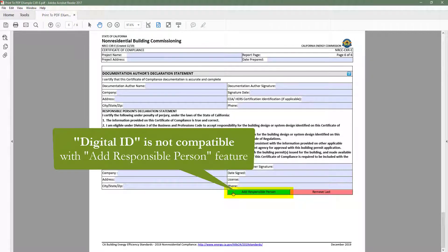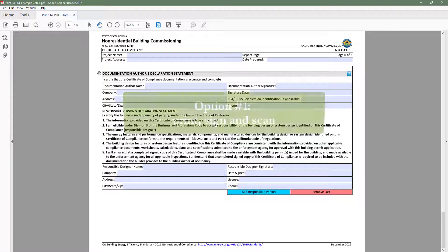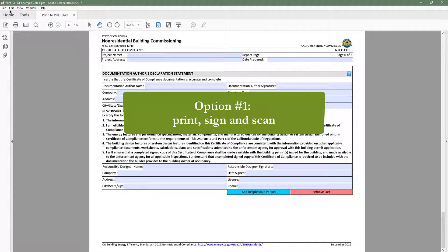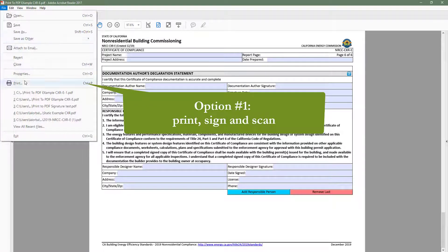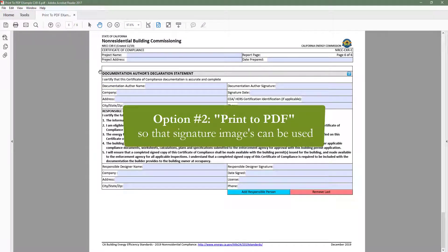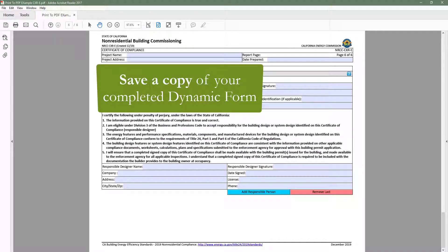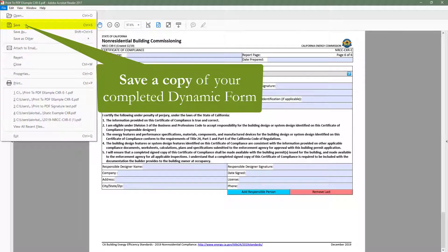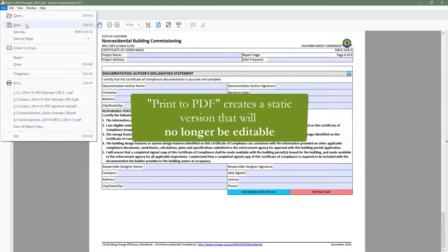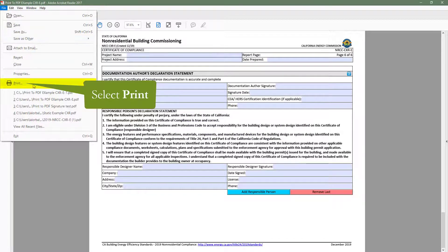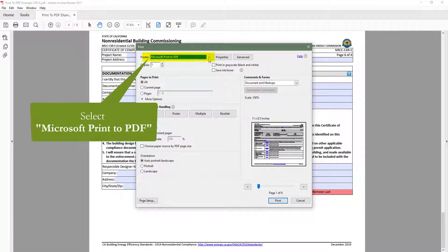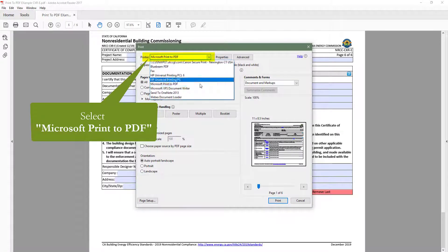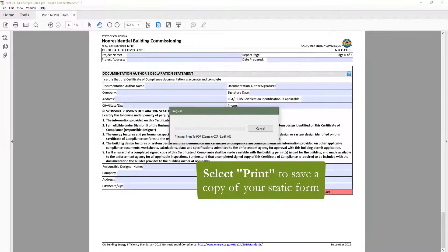This added feature eliminates the ability to use Adobe signature. To sign the CXR, you will either need to print, sign, and scan to your computer, or you can print to PDF, which will create a static version of the form allowing for signature images to be used. To do that, you will first want to save a copy of your completed form, as printing to PDF will create a static version that will no longer be editable. Then you will go to File, Print, and select Microsoft Print to PDF, then click Print to save a copy of your static form.